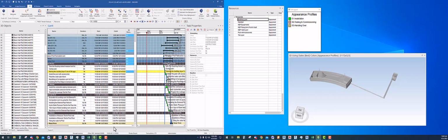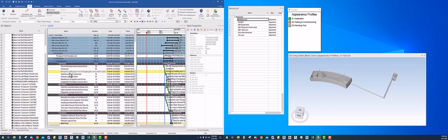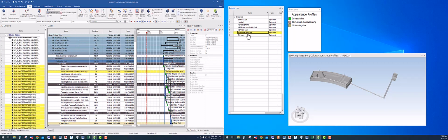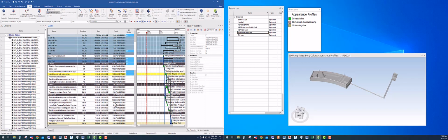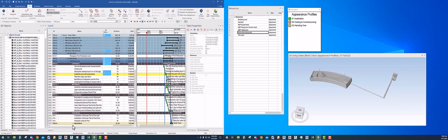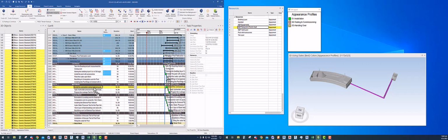Correct. Now the second one is install the pool with accessories. So I have pool with accessories. I'll select and click and drag here. It will also assign. Even if you want, you can select and put it here, so that it's easy. Now install the connecting piping between pool and mechanical vault. So MEP piping from pool to vault will come here.